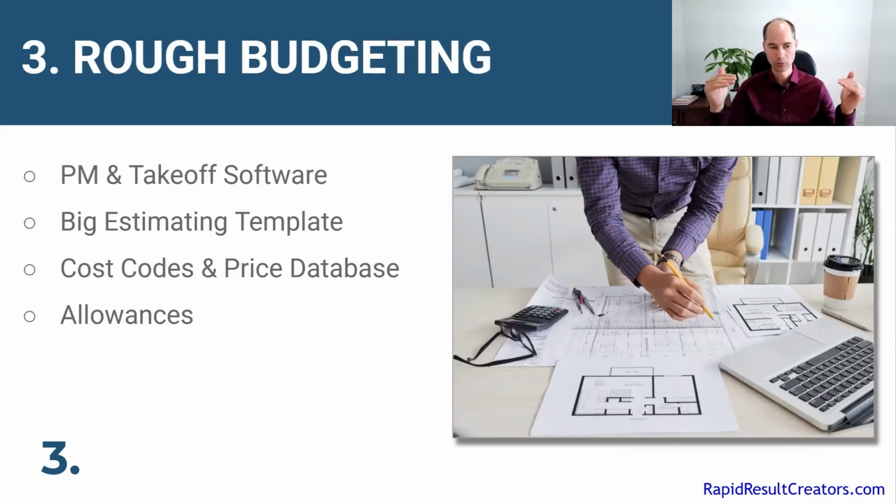If they're like, we're okay with 1 million, and then they can see how their decisions are driving that price, you will probably end up at 1.2 by the time you get down to the detailed design. But at least the client understands that it's their decisions that have influenced the price. If they want a lower price, they have to accommodate with lower selections or a different design or what have you. So you want to be very clear in the estimate, this is an allowance.